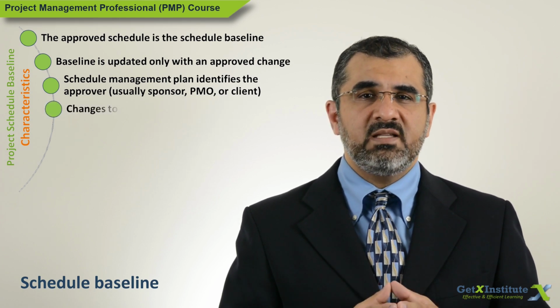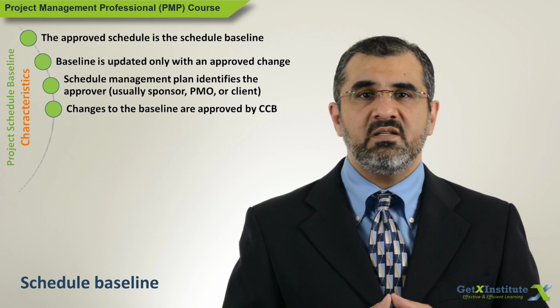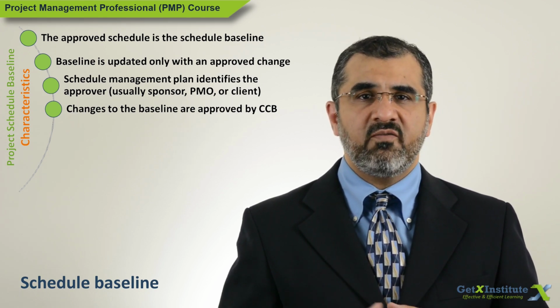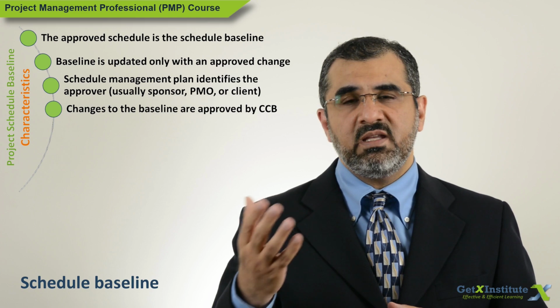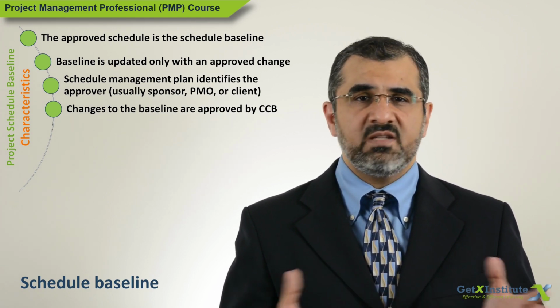Changes to the baselines may be approved by a change control board, and some organizations may require further confirmation of the change by the sponsor. The practice differs in various organizations.